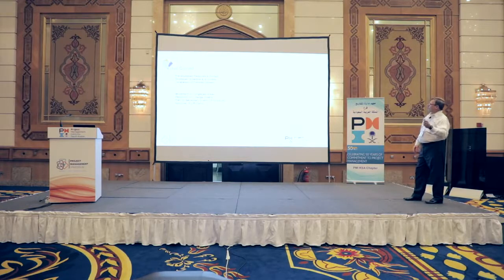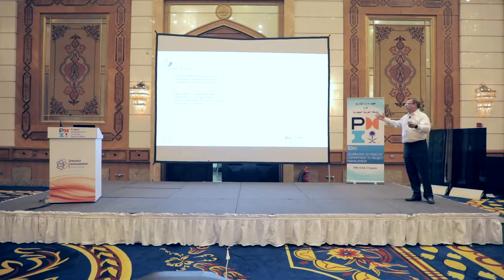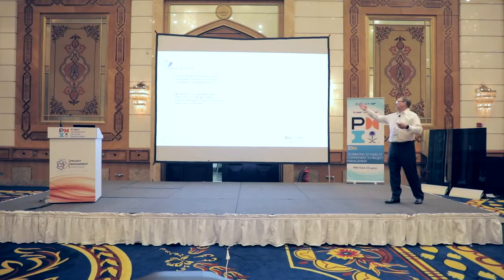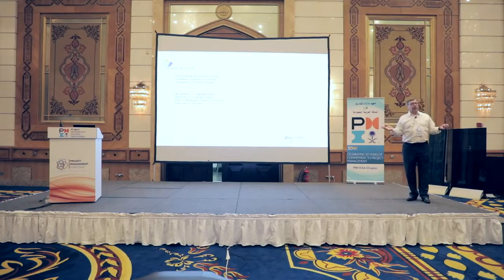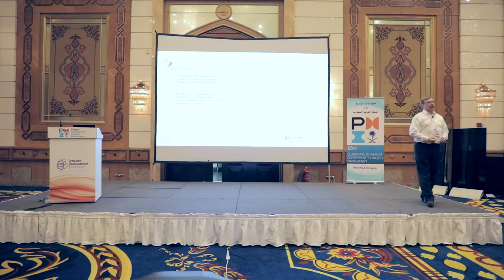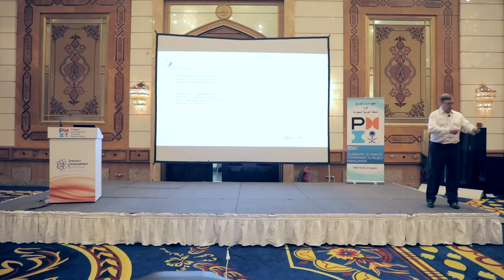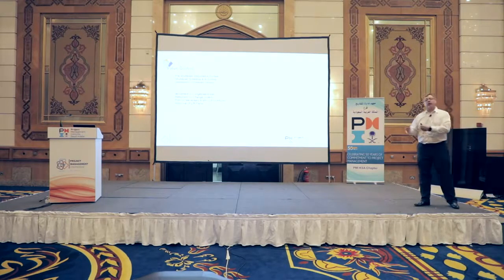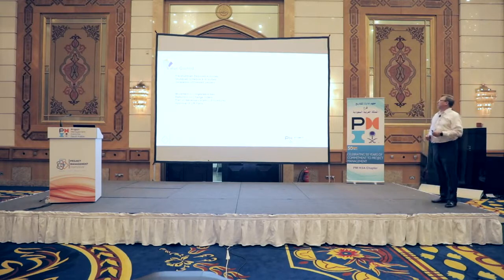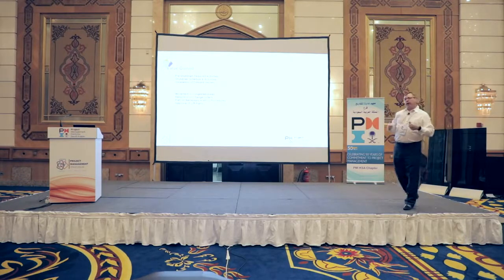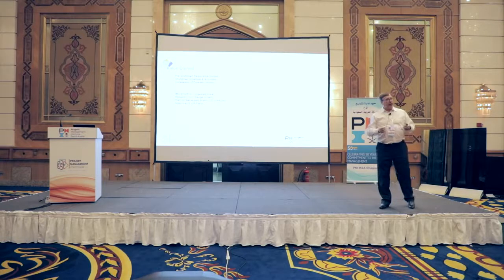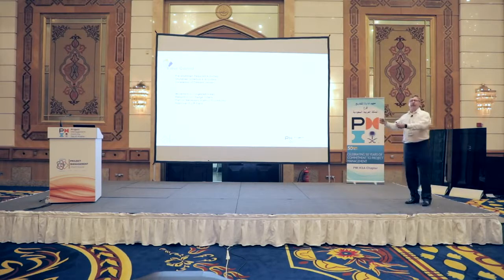Confirmation enhancement of project constructability. We talked about the constructed area, so we showed how we can move through these tight spaces. Knowing our scope, we can reduce change orders, right? We have an understanding of all the work that's required, the work required pre-shutdown and the work required during shutdown. Plan on necessary ramp-up procedures, right? We talked about the overhead lines, right? Knowing about my overhead lines, I can get my approvals done ahead of time and not have to face that issue during the shutdown.